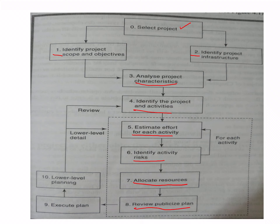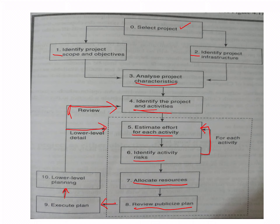Then step eight: review and publicize the plan — steps five through eight are put in a box because this is an ongoing process. For each activity you identify risk, go back and re-estimate efforts, then execute the plan. Step ten is lower level planning, after which you again go back to identify products and activities, and lower level details feed back into the effort estimates. This is the diagram you are expected to draw.